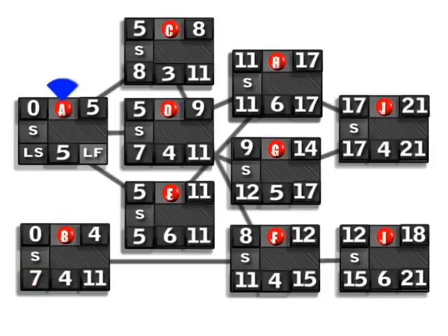For activity A, however, we have to make a decision. We see that we have activities C, D, and E that come after activity A. So we need to choose the lowest of the late start times for our late start for activity A, and that happens to be 5. 5 minus 5 is 0.